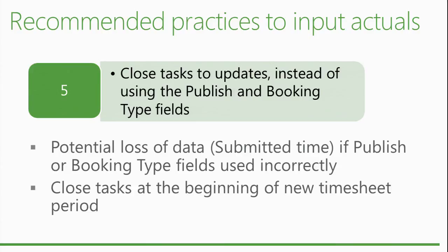Yes? If you want to use single entry mode and update that task, and you want to use administrative time, what do you do? Well, you can do both. Because single entry mode allows you to input your timesheet that is pushed into the task update. And the timesheet is the only way to have admin or non-project time. In your project plan, you have nothing for non-project time. If you can use timesheet, it's better to track all the time. Otherwise, if timesheet is not an option, then you have to go back to plan B, the one I was explaining about, using a regular project to store this non-project time and trying to limit the number of resources and the duration of the tasks that you have.